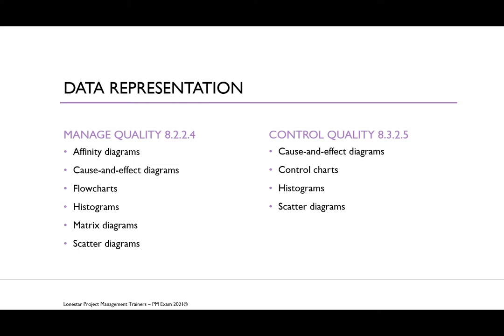Now, your control charts can be used to monitor various types of output variables, and although used most frequently to track repetitive activities required for producing manufactured lots, your control chart may also be used to monitor cost and schedule variances, the volume and frequency of scope changes, or other management results to help determine if the project management processes are out of control.